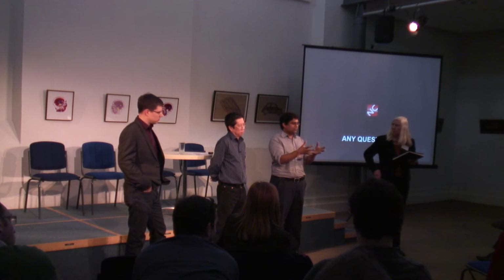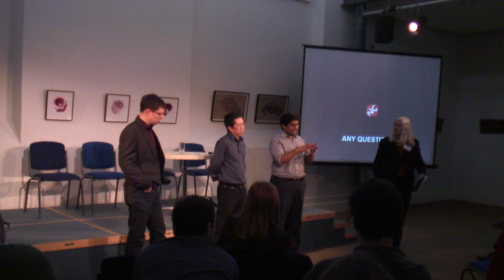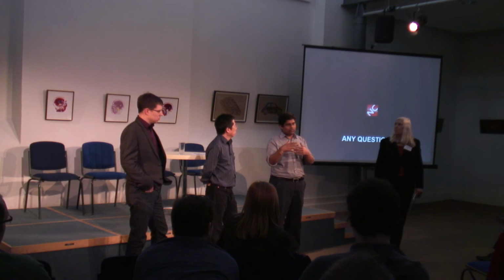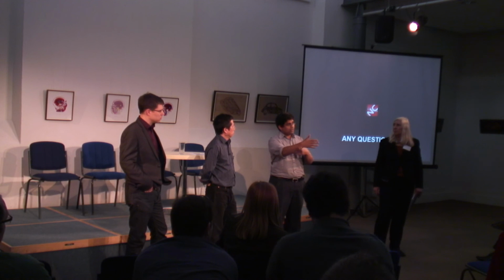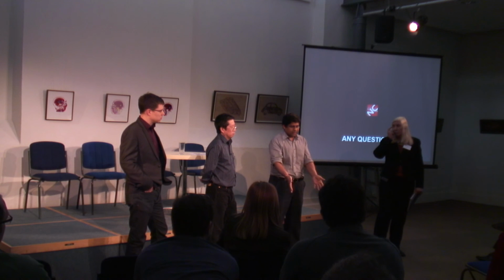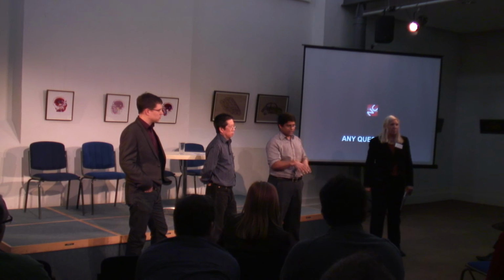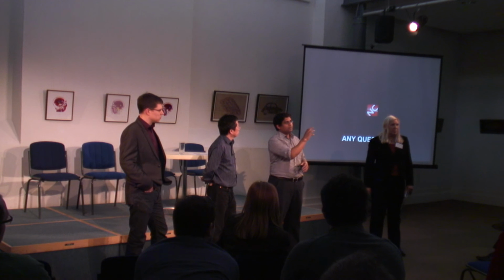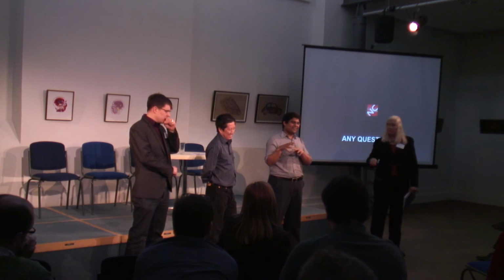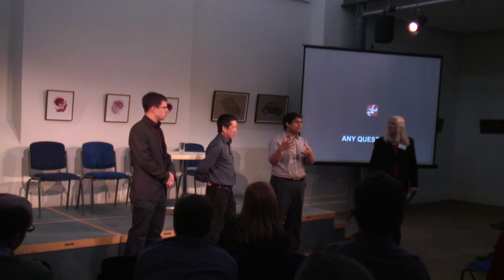During the design stage, you'll have the project design model, the information model, which is really to coordinate the construction, etc. When you then hand it over to the contractor, certain information might be added or taken away. But all the way through, you need to know what the people who are going to be using it need. They might not need to know what's underneath this floor, but they might need to know what the lighting is. So there's no need to model all the ones below it, but you do need to show the right lights in the right place. It's again about knowing what the end goal is and then designing or modelling.